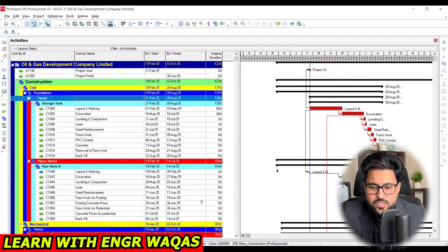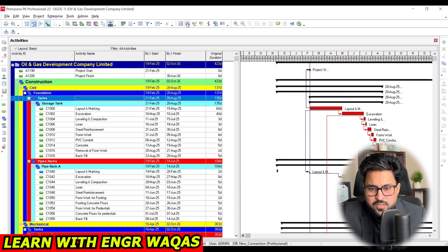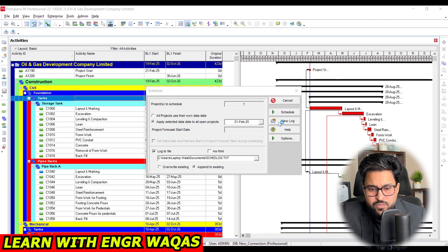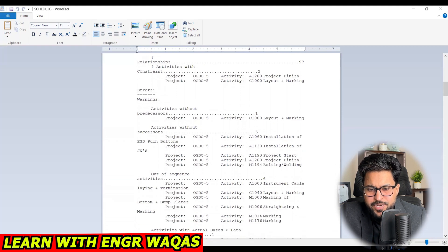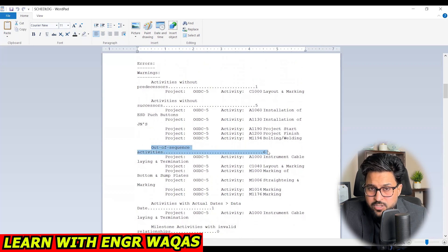This is a project schedule in the tracking phase where many activities are already updated. To check out-of-sequence activities, go into the Schedule window and run the schedule. Then open the View Log — a document will appear in front of you. In the View Log you can find information like project schedule quality indicators and open-ended activities. Here we can see there are six out-of-sequence activities.